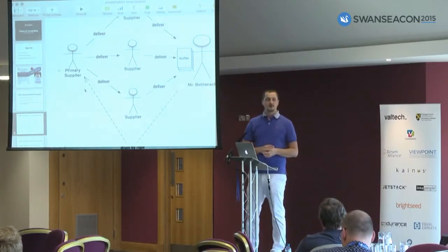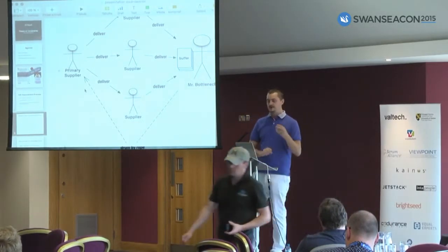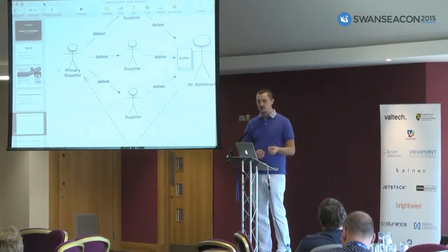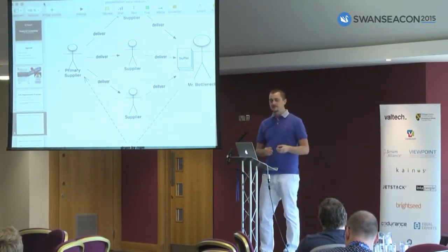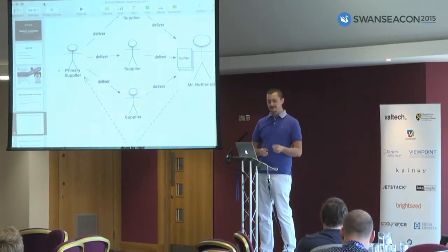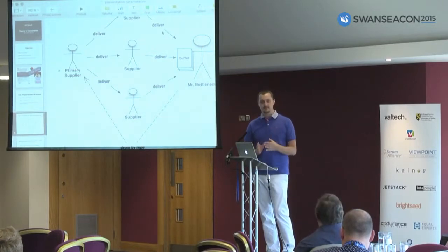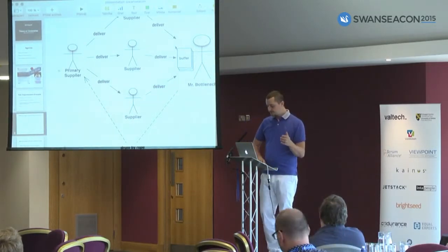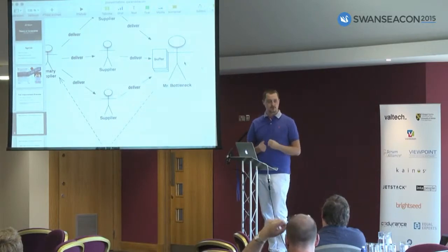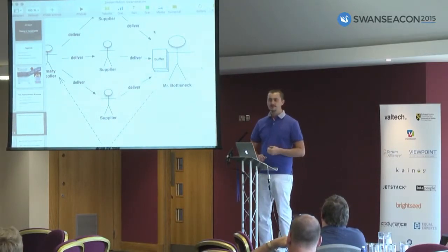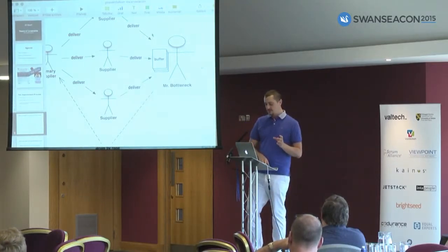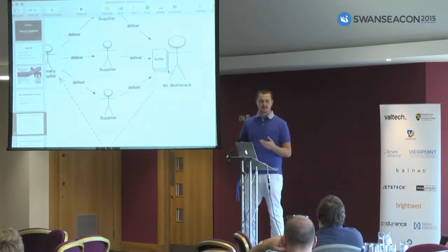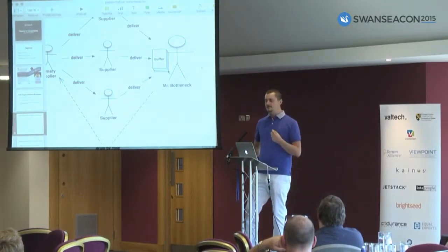But unfortunately, there are fluctuations in the performance of different parts of development. The developers are sometimes faster and sometimes slower, product owners are too, they go on vacation, there is some need of analysis, or you are waiting for a third party, and so on. So you need some safety mechanism, which is called a buffer. A buffer is just a list of items which are prepared for the bottleneck to take and do. The buffer should be as small as possible, but not so small that the bottleneck starves. Bottleneck starvation is a situation where the bottleneck has nothing to do. And this should never happen.